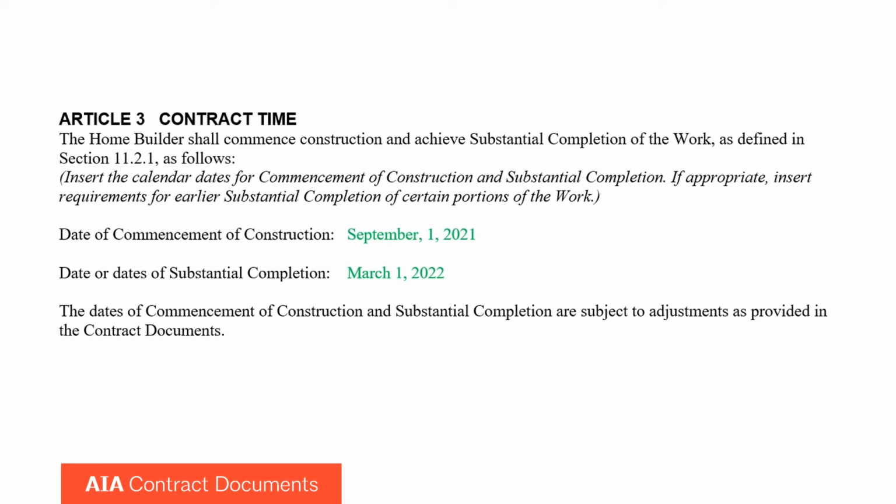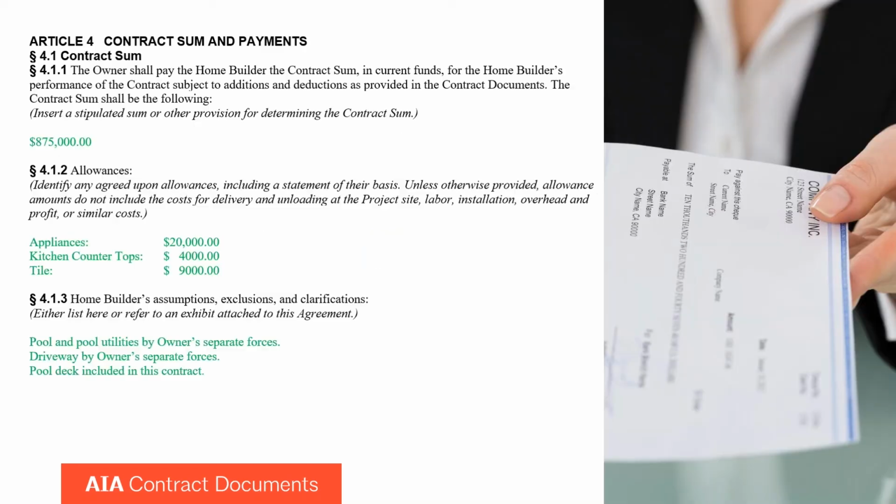And at that point, you would just go through punch list details, small items that may need repair. But the substantial completion date is a very important date because a good portion of your payment compensation comes at this point. The contract time and the cost of the project are the two most important things to the owner. So this substantial completion date will be a very meaningful and important item to infill and to have control over.